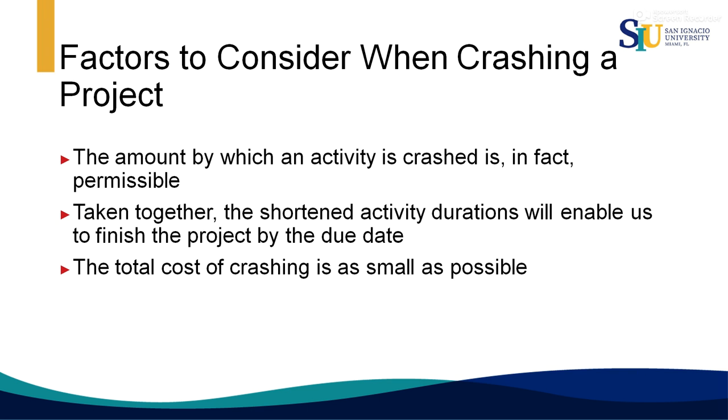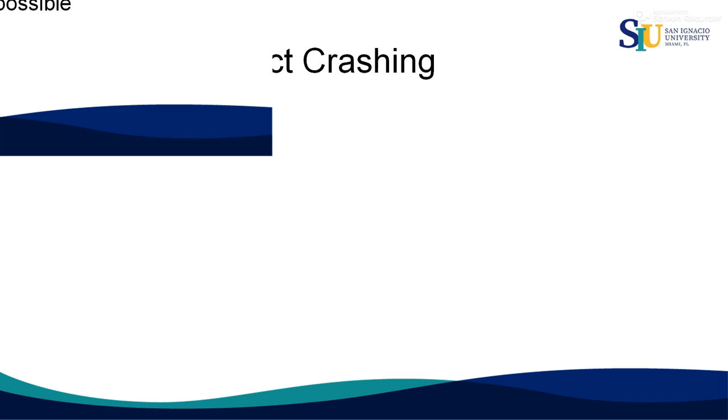You have to take several things into account when crashing a project. The amount by which an activity is crashed is in fact permissible. Taken together, the shortened activity durations will enable us to finish the project by the due date, the new due date. The total cost of crashing is as small as possible. We would like to minimize the cost, because if, instead of 15 weeks, we are going to complete the project in 14 or 13 weeks, we need more people, more resources, then the cost of the project is going to increase. But we would like that increase to be as small as possible.